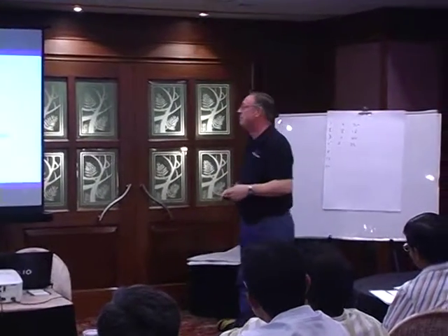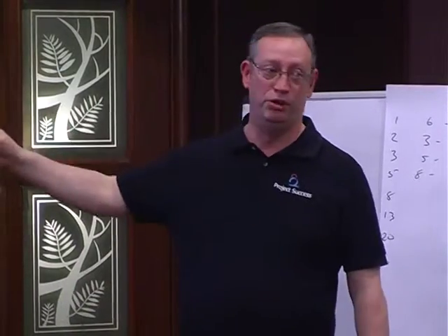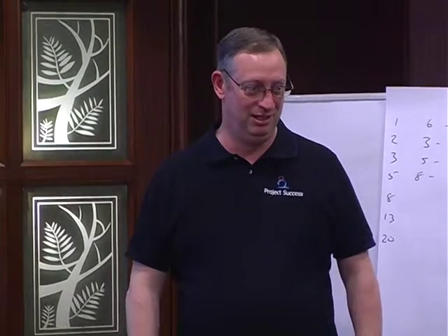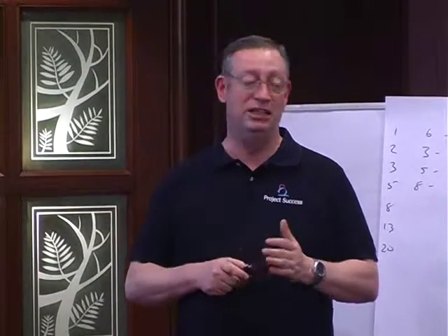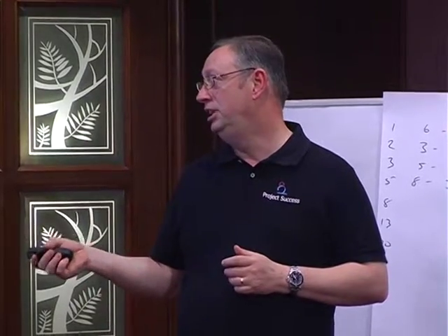Each of these phases of the retrospective requires a different activity. What went well, what didn't go well, what should we change is one activity which applies in one phase of the retrospective at most. A good retrospective should take at least an hour. You need different activities. The Darby and Larson book gives you a suggestion of 12 different activities for each phase of the retrospective. If you did 10 minutes on each of the 5 phases and a couple of minutes of transition time between phases, that's an hour.